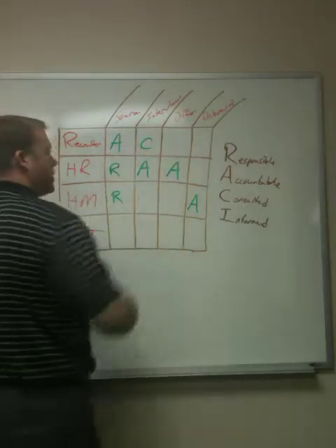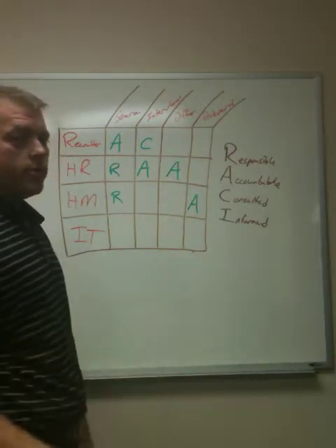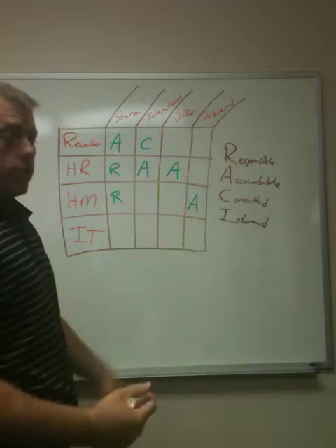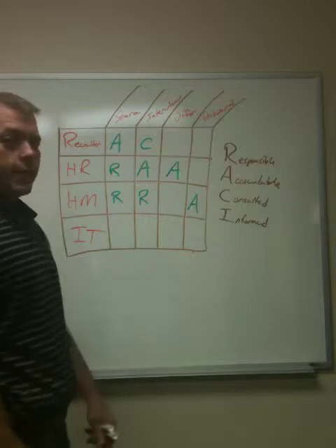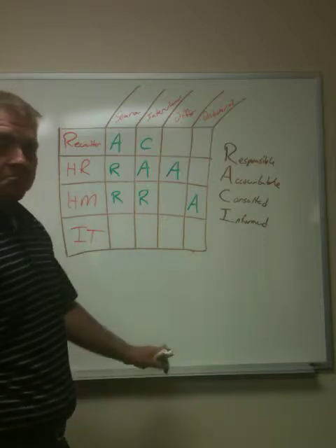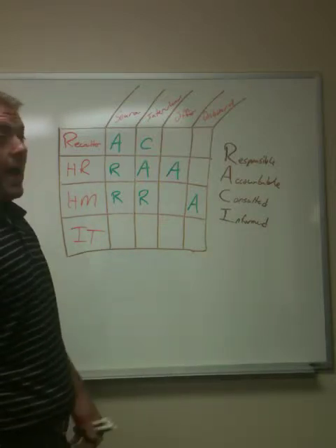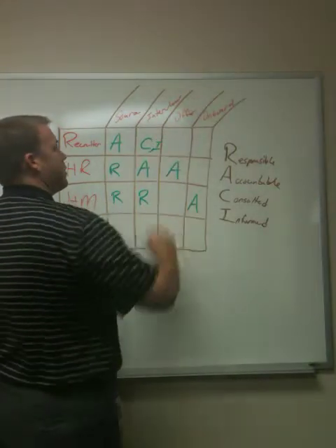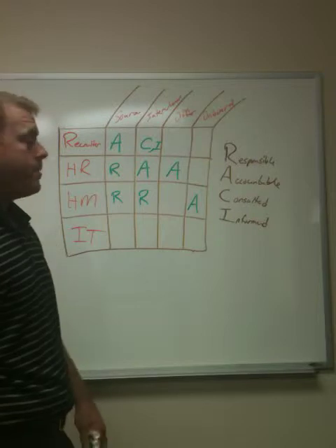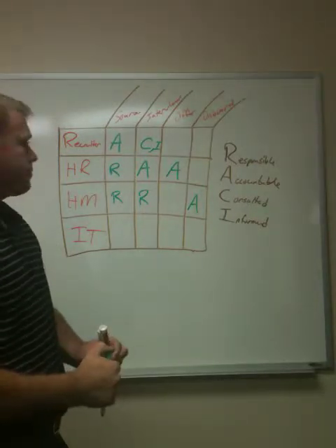So they are consulted. We let them know before we start interviewing, we've got some good slates, we're bringing these folks in to talk to them. Hiring manager absolutely has a responsibility when it comes to that. IT, again, not so much involved. So what do we do after we're done interviewing? Well, we also want to inform our recruiters that we're done interviewing, right? So they have a C and an I.